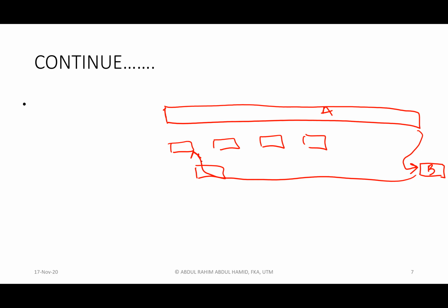Okay, there are some situations, for instance, cut and fill activities with regard to backfilling, with regard to slope, etc., because that area is very big. You don't have to wait for the whole area to complete. You can just start your excavation at a certain point when part of area A is already completed. That is the example.